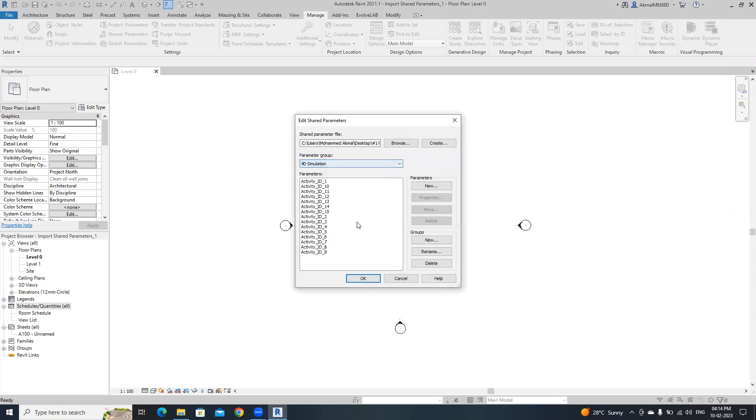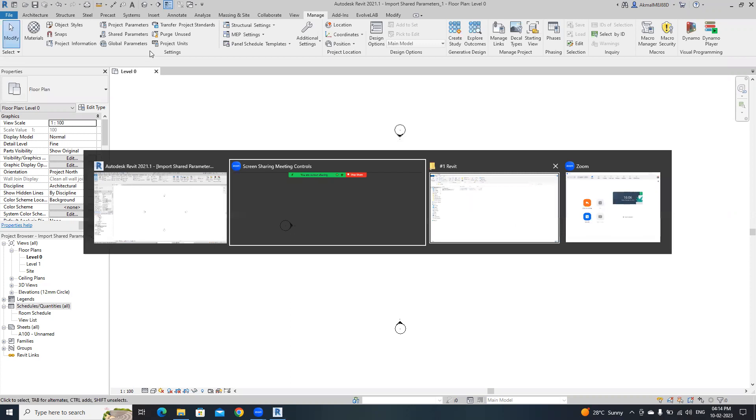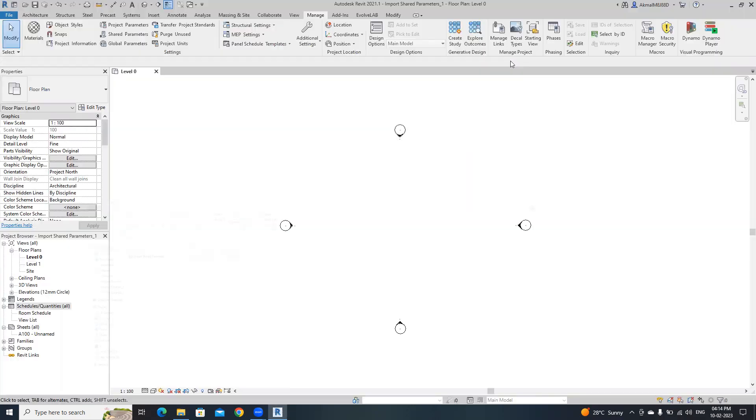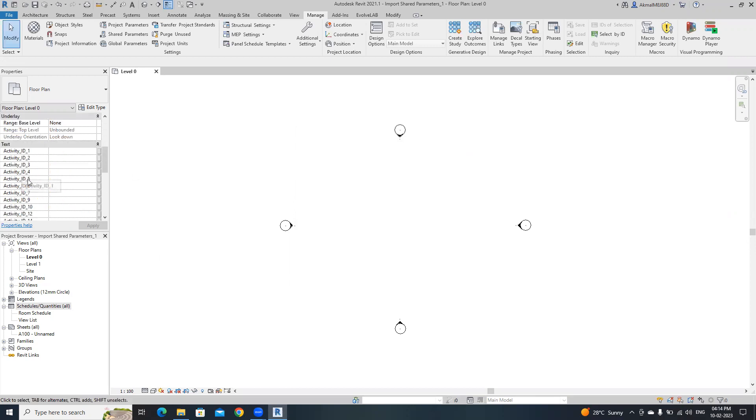I already created the shared parameter with the group name 4D simulation and the parameter names is activityid 1215. I already added this into the project from the 4D simulation text file which is actually a shared parameter file.